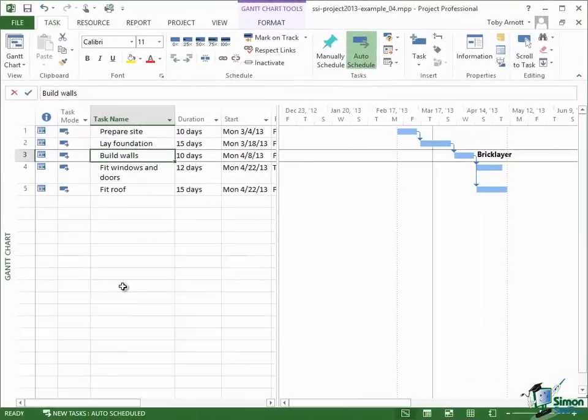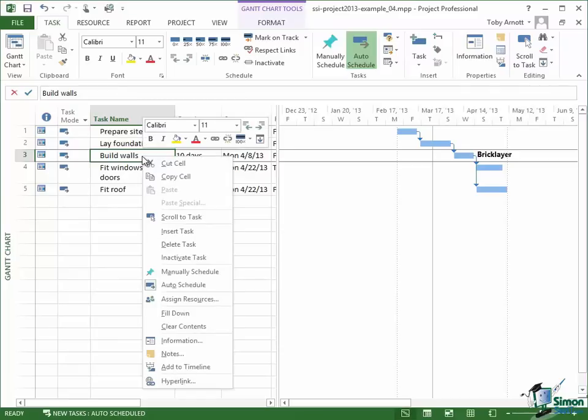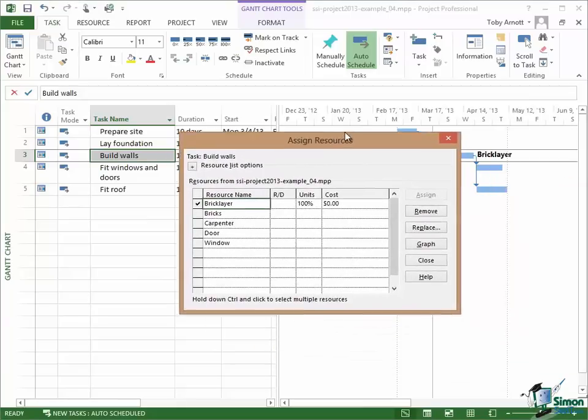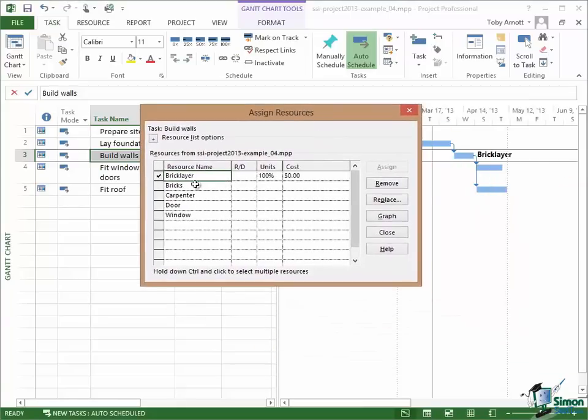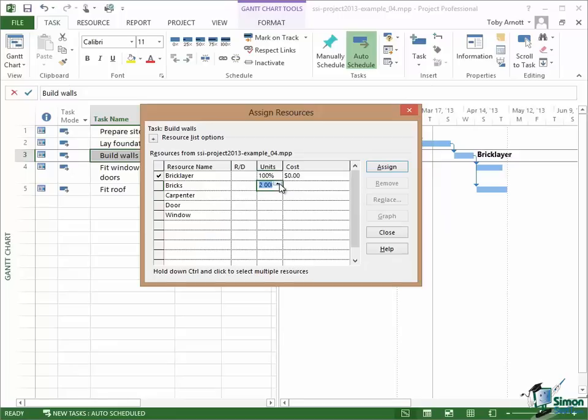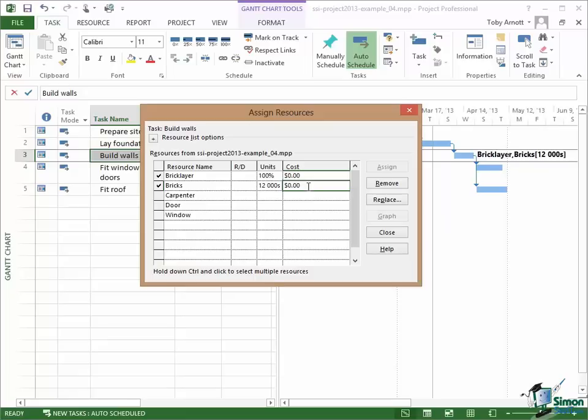So let's now use some bricks. Let's again right click on Build Walls. Click on Assign Resources and this time I'm going to assign bricks, but I'm not going to assign one unit of bricks which of course would be 1,000 bricks. I'm going to assign 12 units because I'm going to need 12,000 bricks for this house. Now if I use the little rollers here, I can go up in multiples. I'm going to say I want 12. Again, if I'd entered a cost per thousandth of bricks that cost would appear here. But it does say in the Units column there 12 and then my Units, Thousands. So it's 12,000ths of bricks.